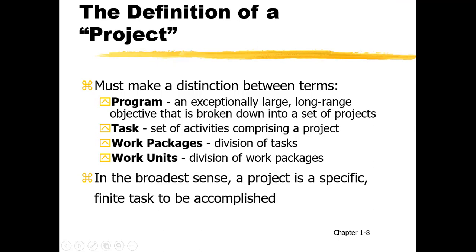What is a task? A task is a set of activities — two, three, four, five, six, seven, ten — a set of activities comprising a project. So within a project, you have tasks. What are work packages? Work packages are a division of tasks. You can divide tasks as per their homogeneity. For example, all purchase activities can be treated as the activities of a purchase department. All supply activities in another set, all IT activities in another set — this way you can make work packages.